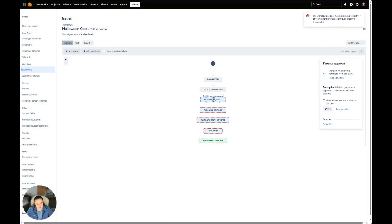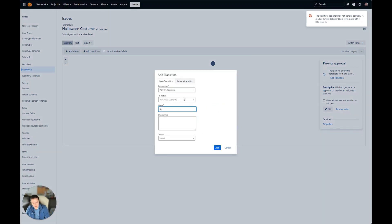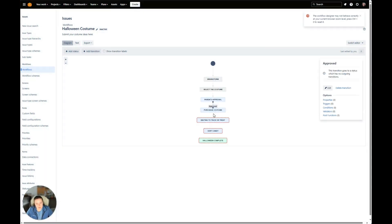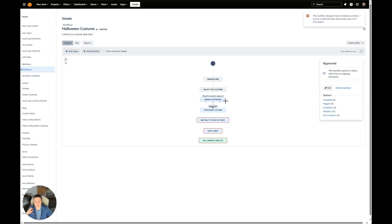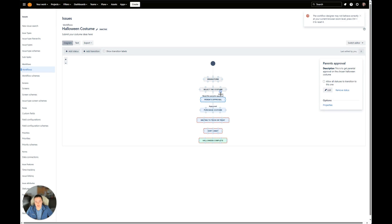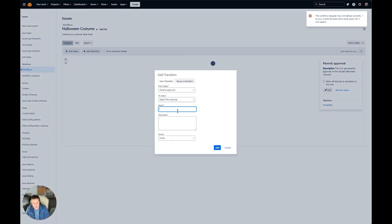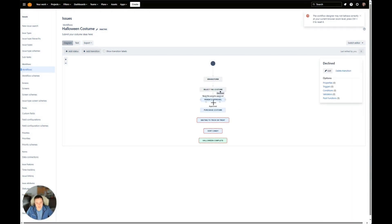After you select the costume, we're going to have to go to approval, so we'll say Need the Parent's Approval. Go ahead and add. Now after we go to Parent's Approval, if it's approved, we're going to go to Purchase Costume — so we're going to make this one Approved. In order to have an approval status, you have to have two outs: a transition that'll take the status to if it's approved, and if it's declined, you have to have a status where it's going to go to. So if Parent's Approval is approved, we go to Purchase Costume. If approval is declined, we're going to go back to Select Costume — we'll call this transition Declined. So if it's declined, it'll go back up to Select the Costume, and then eventually once approved, it'll go to Purchase Costume.